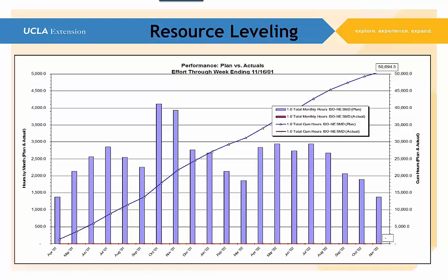Those are very serious changes in staffing in a project when you consider that you got to assimilate the people, you got to have work for them, you got to be ready for them, and they got to be able to do work. So when you're looking at your staffing, and if you look at the smoothness of the curve, and I'm talking about not the cumulative curve, but I'm looking at the smoothness of the month-to-month transitions, you can see where there'll be difficulties assimilating or bringing people in, or how fast you've got to relieve them when they're no longer required.